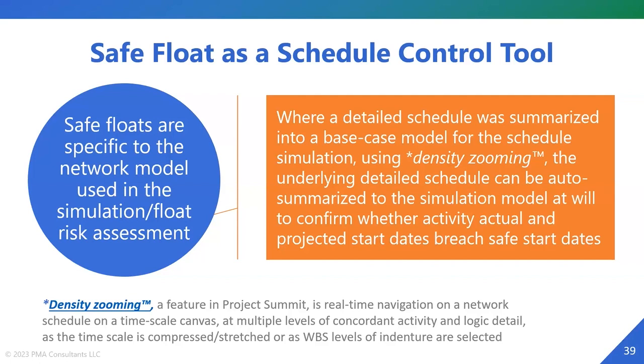However, if you do have access to our latest software offering, Summit, you can density zoom out your schedule at any point in time using some kind of a summary coding scheme or your work breakdown structure. You can actually zoom it back out to your original base case model and see whether or not your projected start dates are still safe or not, or you can simulate it again based on the remaining uncertainty, where your data has advanced.